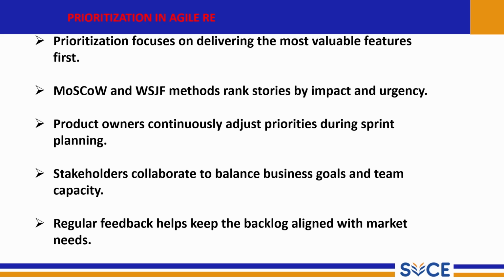MoSCoW and WSJF methods rank the stories by impact and urgency. Using those methods, it will give importance to the important requirements and the urgency of the user stories or user requirements.